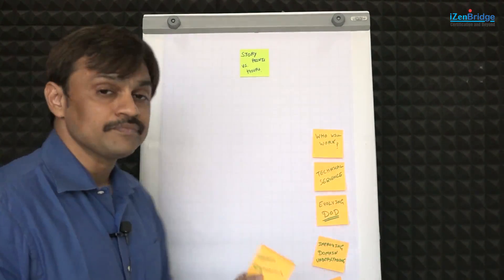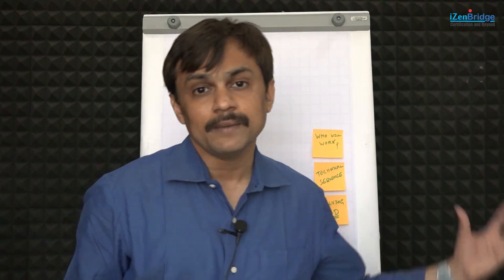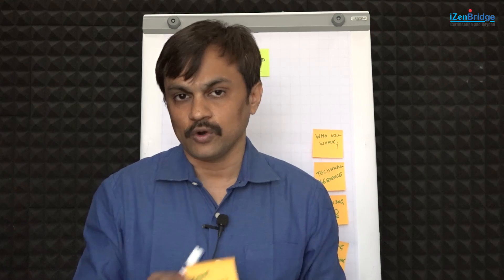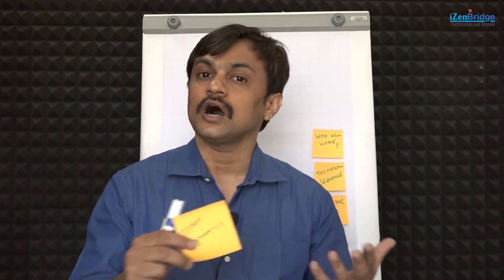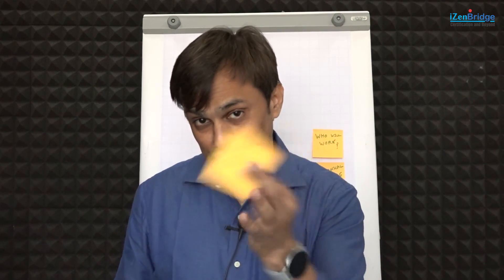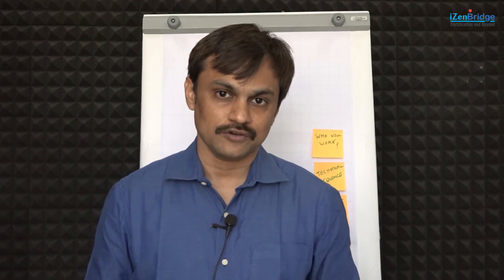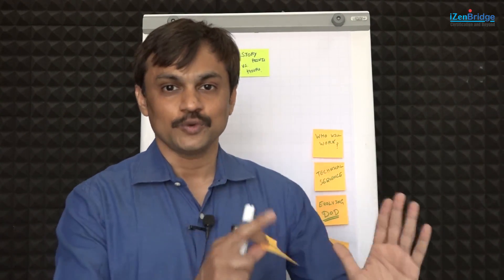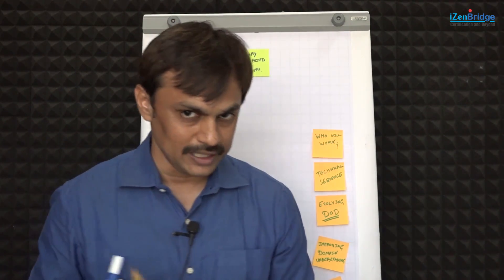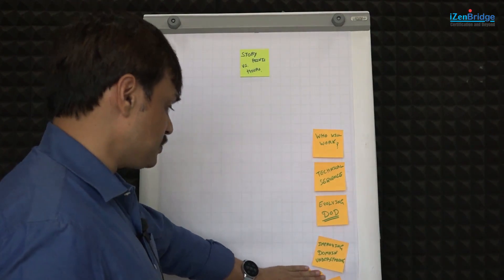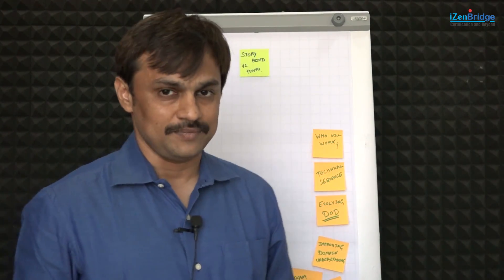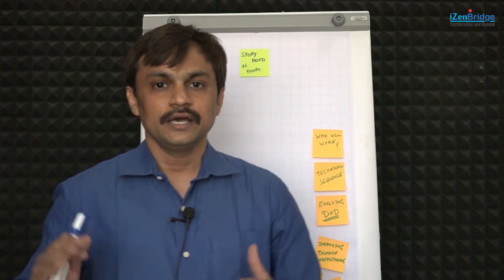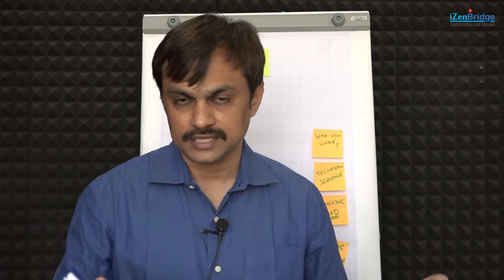Team dynamics - you have an experienced guy leaving the organization or a new member joining the team, and all these team development stages also impact your overall working on the work. Actual effort depends upon how the collaboration is happening at the team level, and change in that collaboration or dynamics can also change your actual effort. We can't estimate the team dynamics for the next month, and that's why we want to estimate the size in an absolute size manner only. Now after listening to all this, you may get an idea that it might be difficult to estimate and equate story points with hours because hours are progressively discovered.